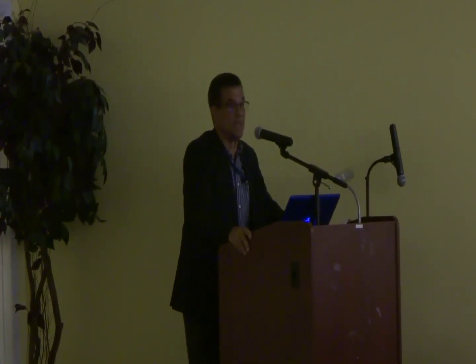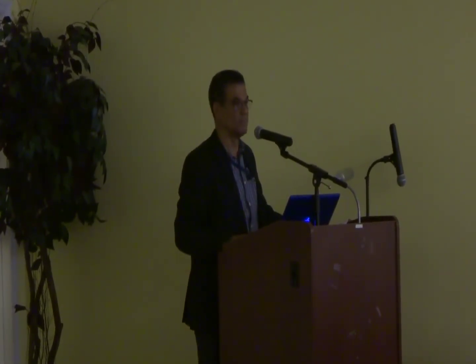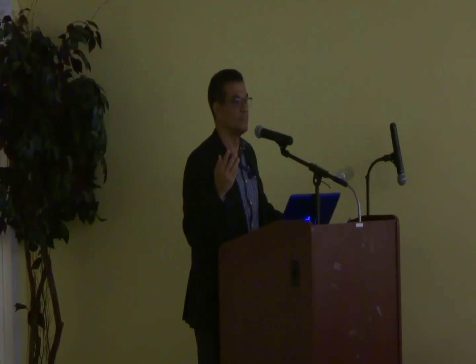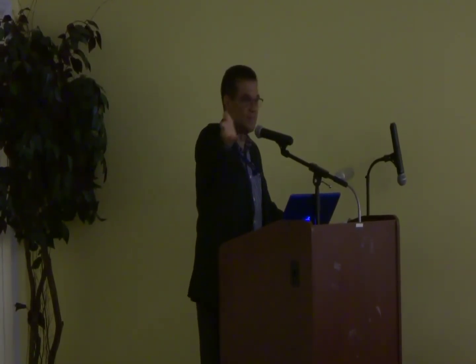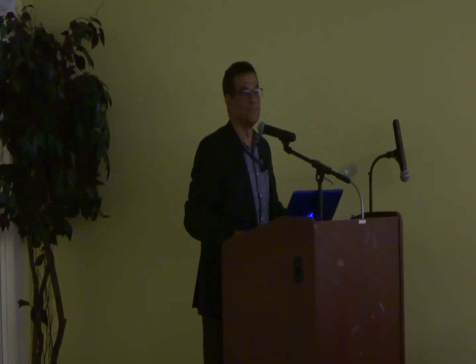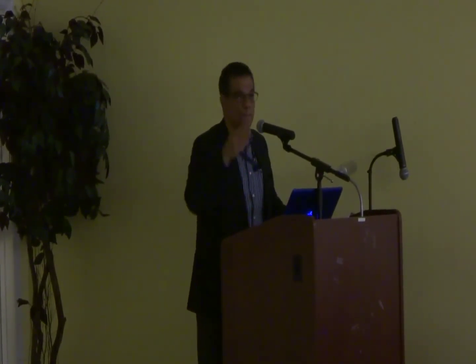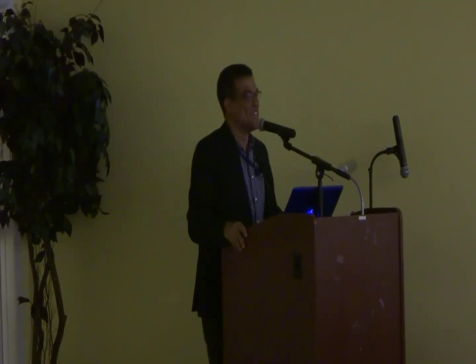A tender period depends on, anybody could answer? That's our interactive session. What does the tender period depend on? Complexity of the project. Anything else? What about terms of the contract? Terms of the contract, to some extent. Buildability. Political considerations. If you have an election around here. The type of tendering document.